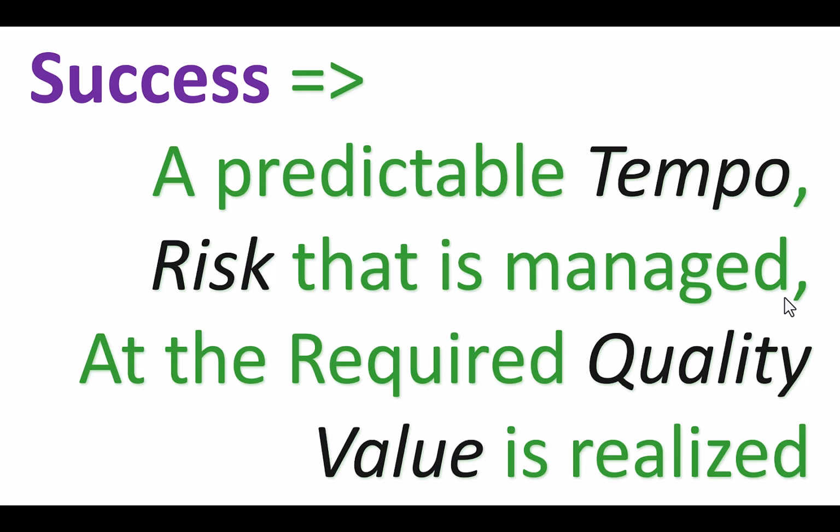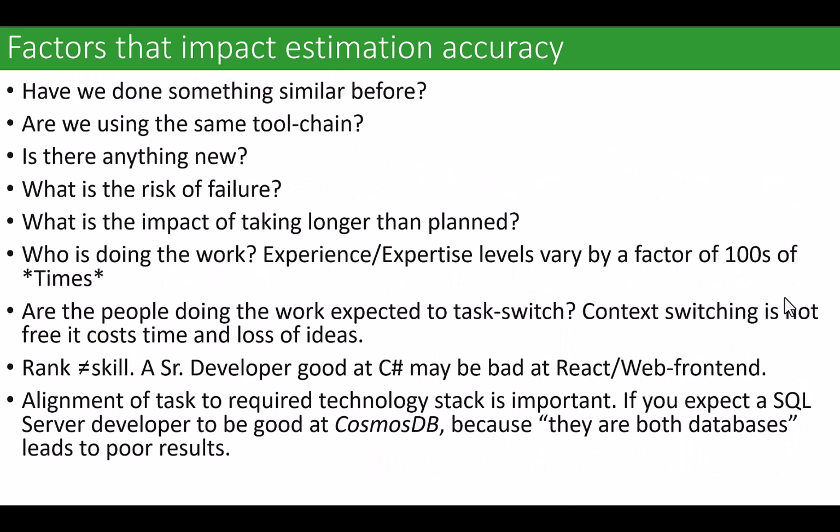You can have the best piece of software your team's ever coded, but if it doesn't deliver business value, you miss the mark. Estimation is hard because there's a lot of things that can perturb our estimation. So have we done something like it before? Are we using tools we're familiar with? Are we introducing new things? What's the experience level of the people doing it?